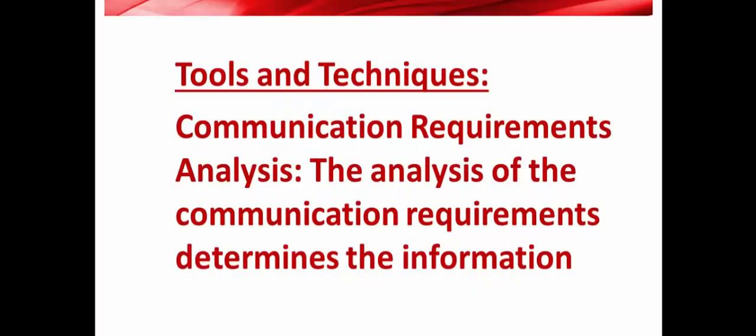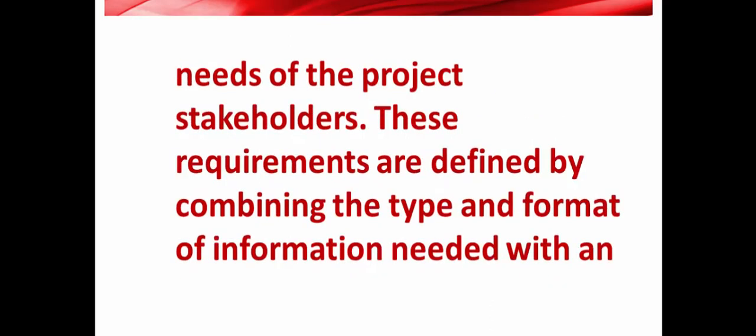One of the important tools and techniques for this process is communications requirement analysis. This analysis considers the communication requirements of the various stakeholders. First, we need to determine the number of stakeholders, and then we can determine the potential number of communication channels needed to manage communications properly.